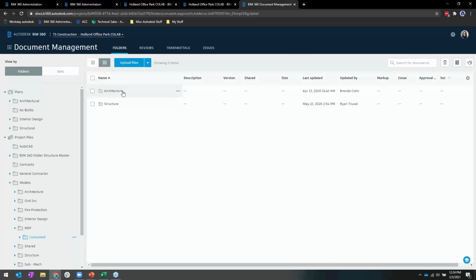When I was at the architecture firm where I was the BIM manager, I spent a lot of time working on this courthouse with one of the principals, and he wanted to change up how the bathroom was done. So we went down there and we did some design options, and it ended up that the area we had wasn't big enough. If we had let that work be seen by the MEP guys, there's a possibility they would have started rerouting their plumbing and their mechanical, when in the end, that's not what we went with. So that means we wouldn't have actually made a package until we had worked all that out.